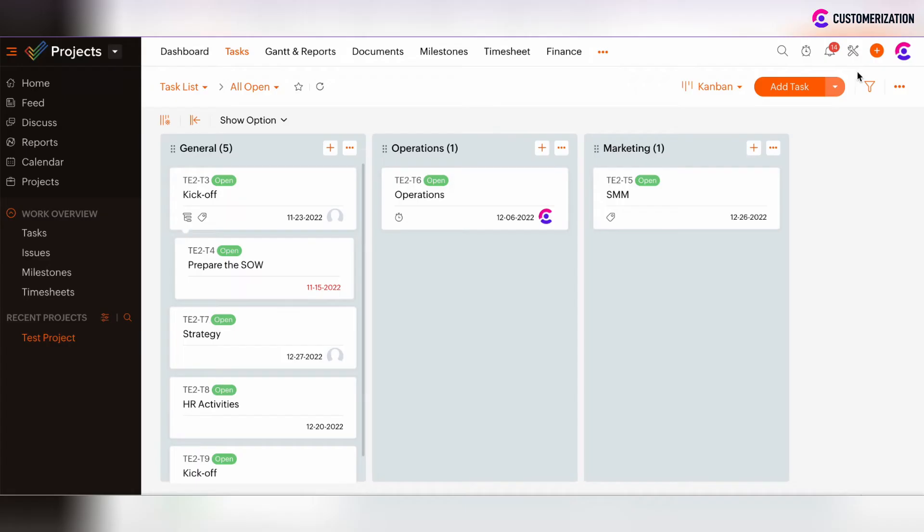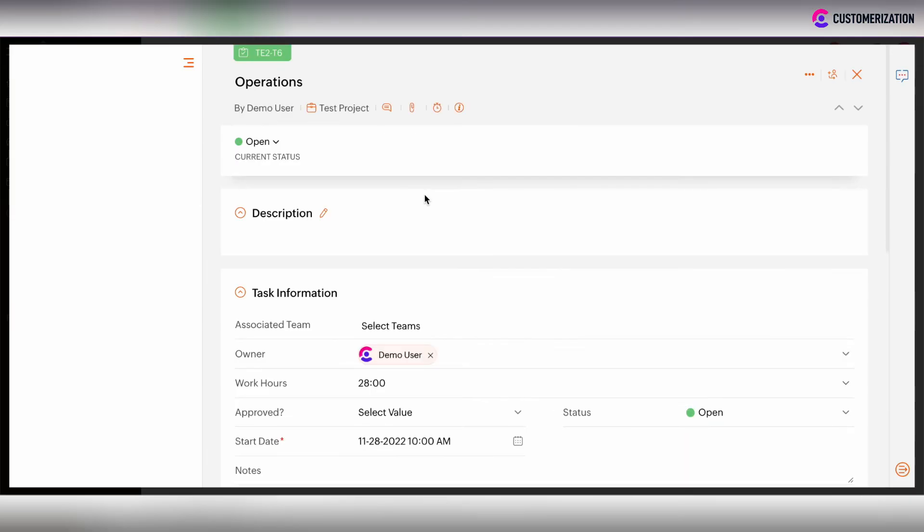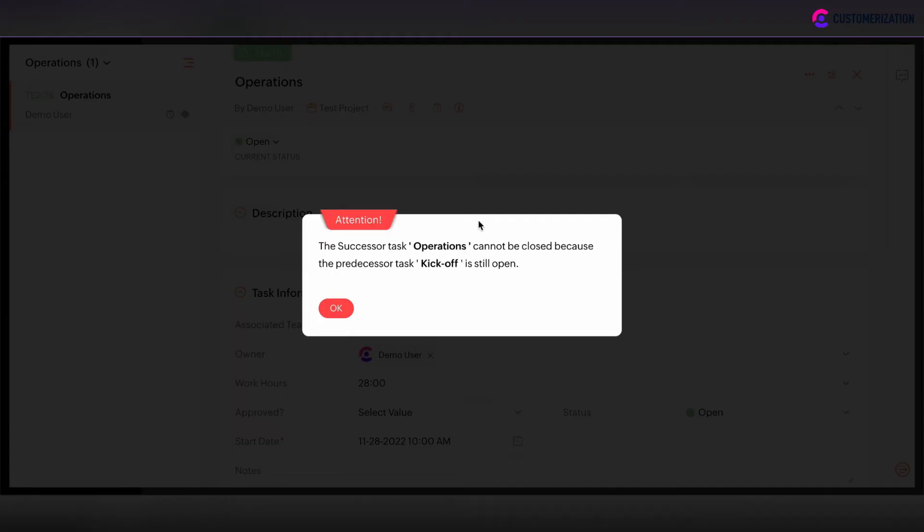Okay, let's try to close the operation task before without the kickoff task closing. Click on operation and try to close it. The same error message because kickoff is still open, that's why I can't close the operations.